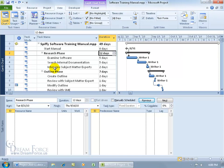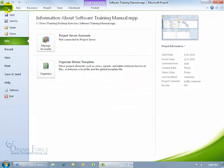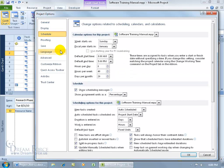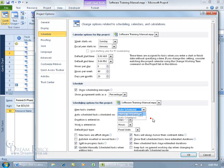My preference is the automatically scheduled task mode. To make it always default to that mode when you create a new project, go to the File tab, down to Options, then to Schedule, and change the new task creation setting from manually scheduled to auto scheduled.